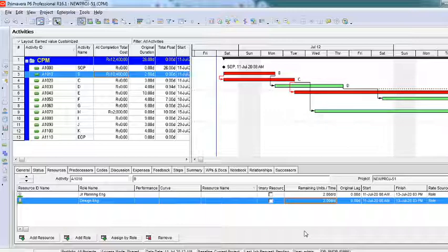You get something called admin preferences, then admin categories, then currencies. In currencies, when you click on the currencies option, you will get an option called add. By default there will be no Indian rupees. If you have a list of currencies there, find out whether we have Indian rupees. I don't think so. By default Oracle has not created Indian rupees, so on the right-hand side you have an option called add.